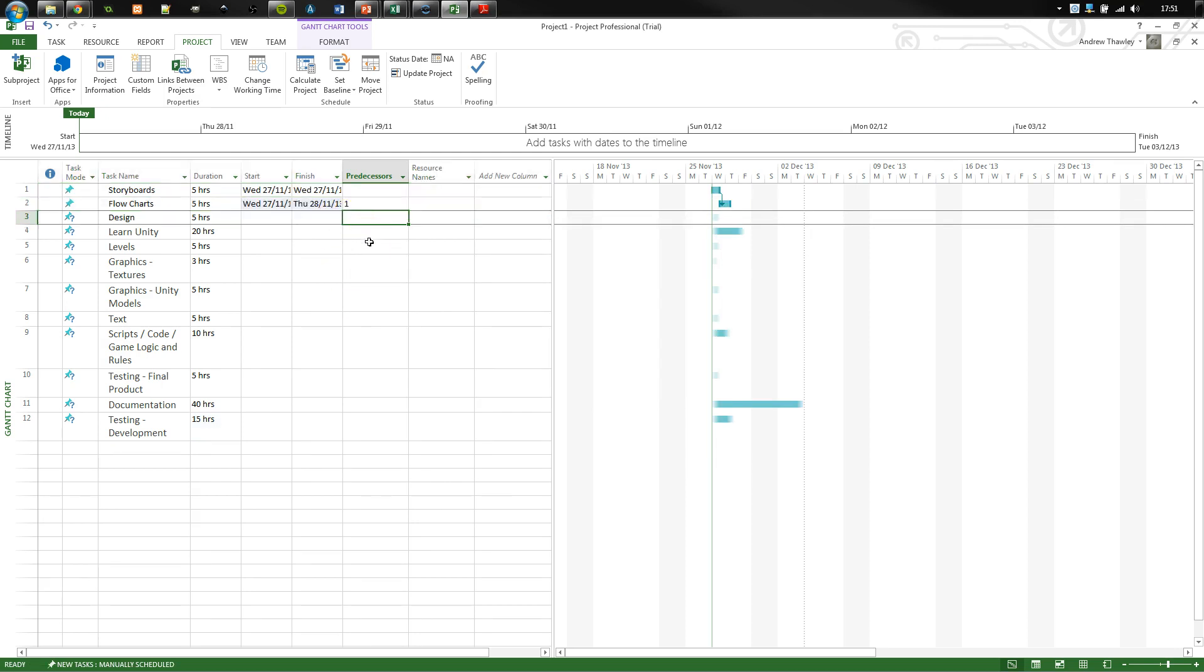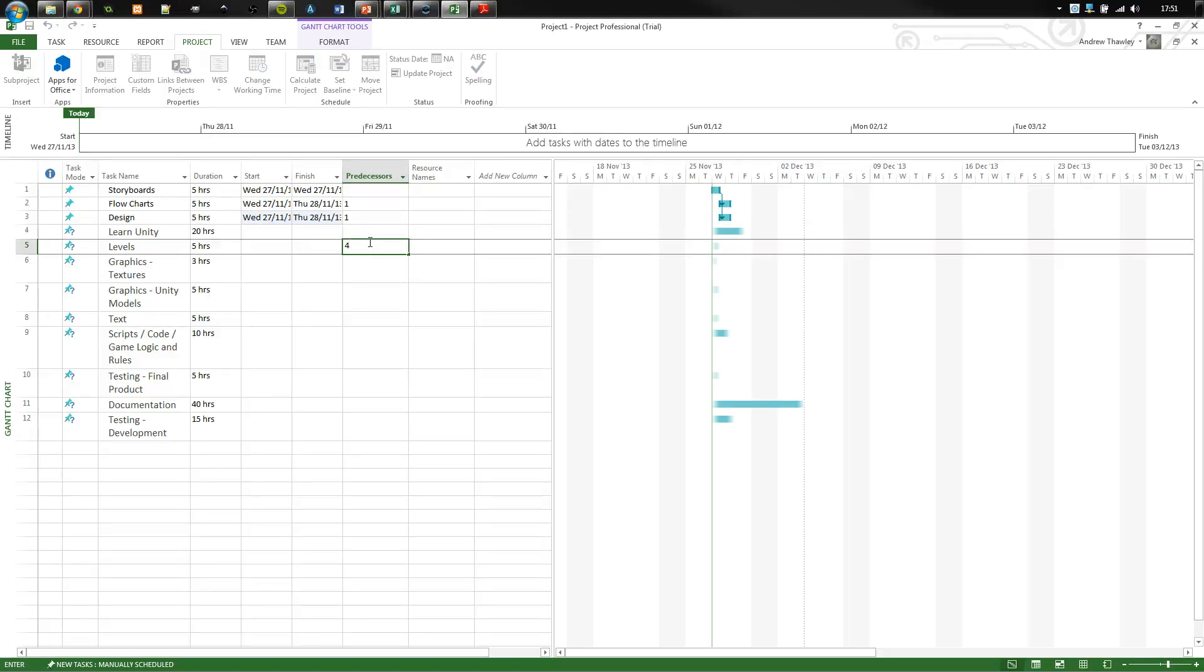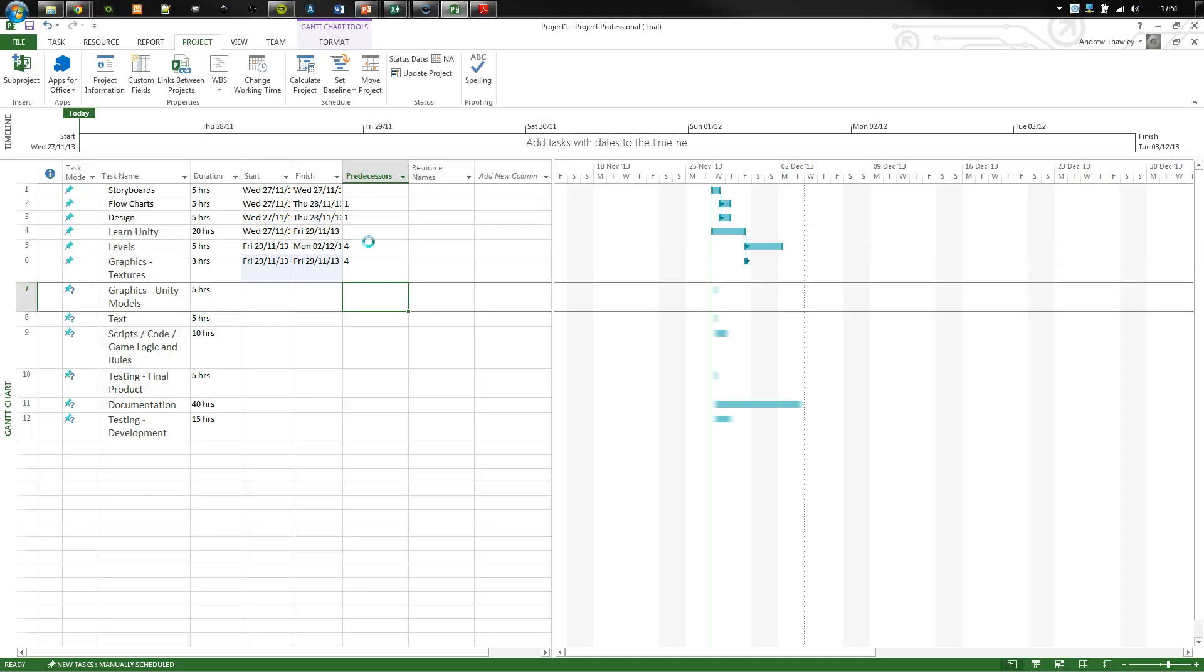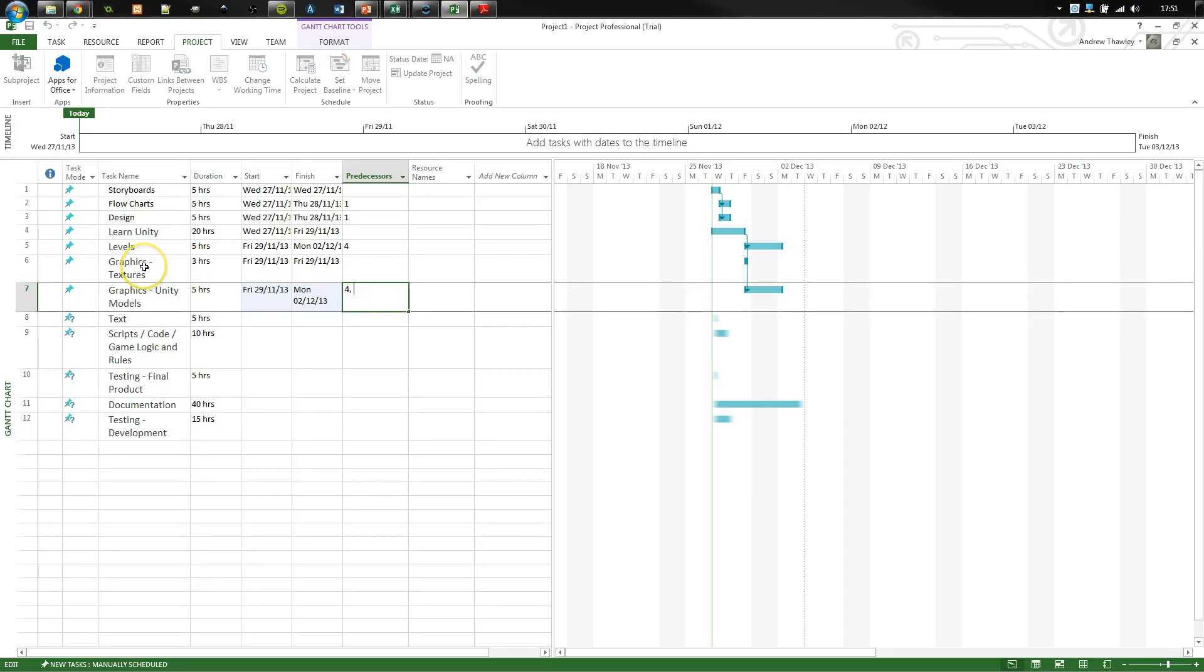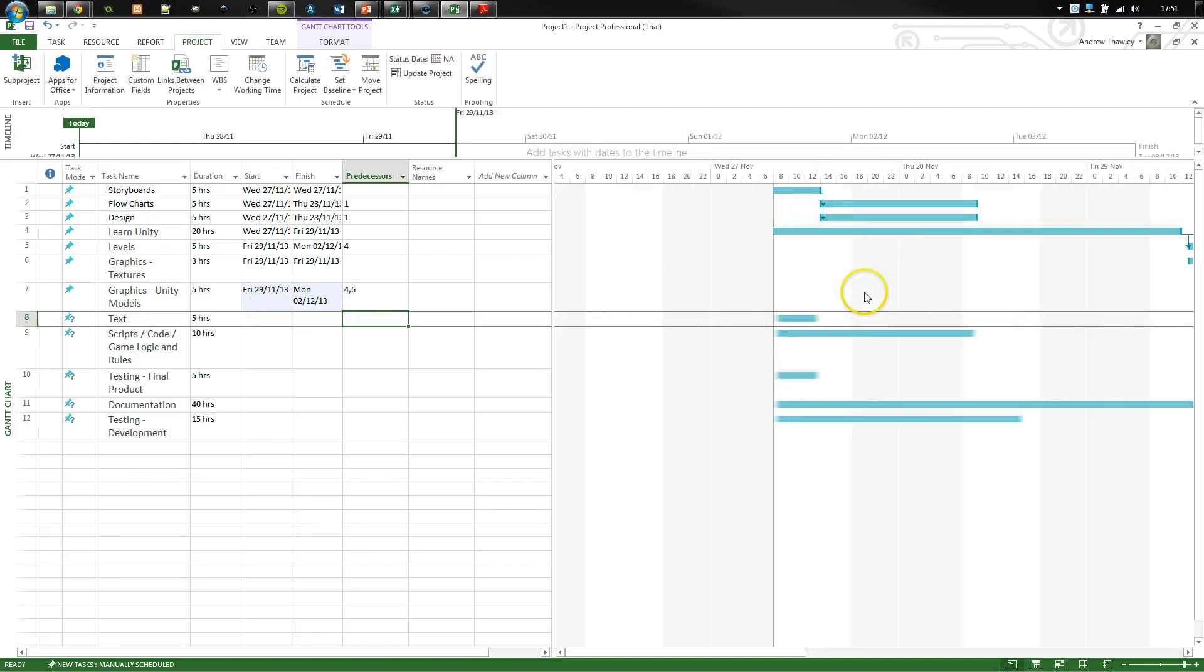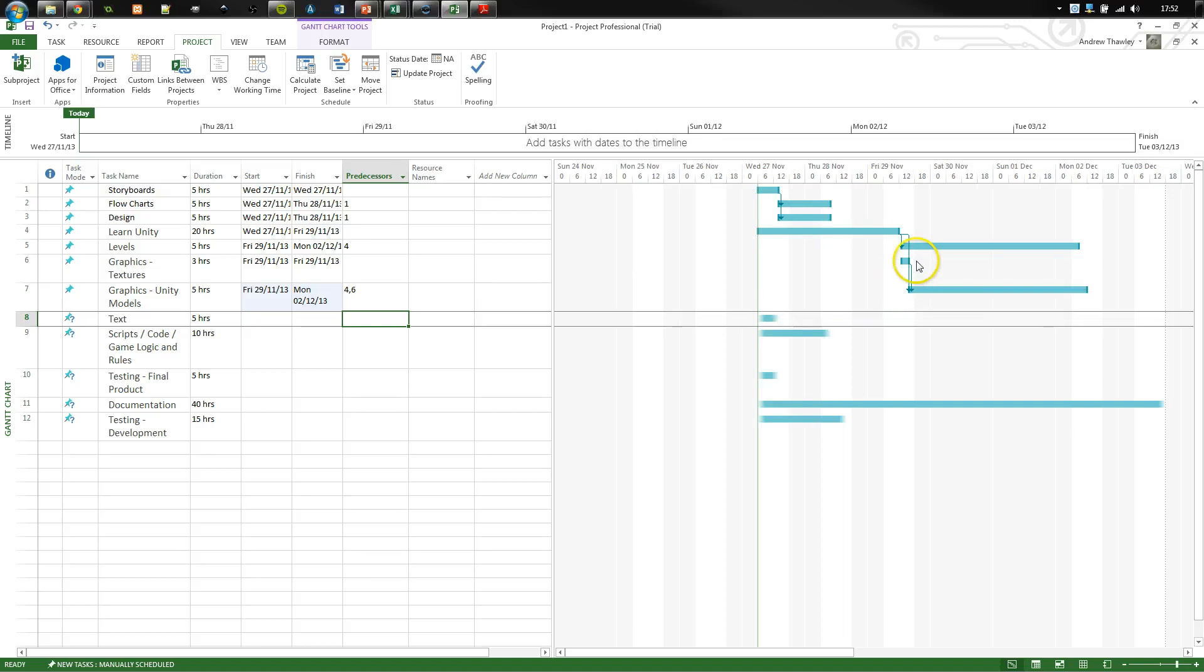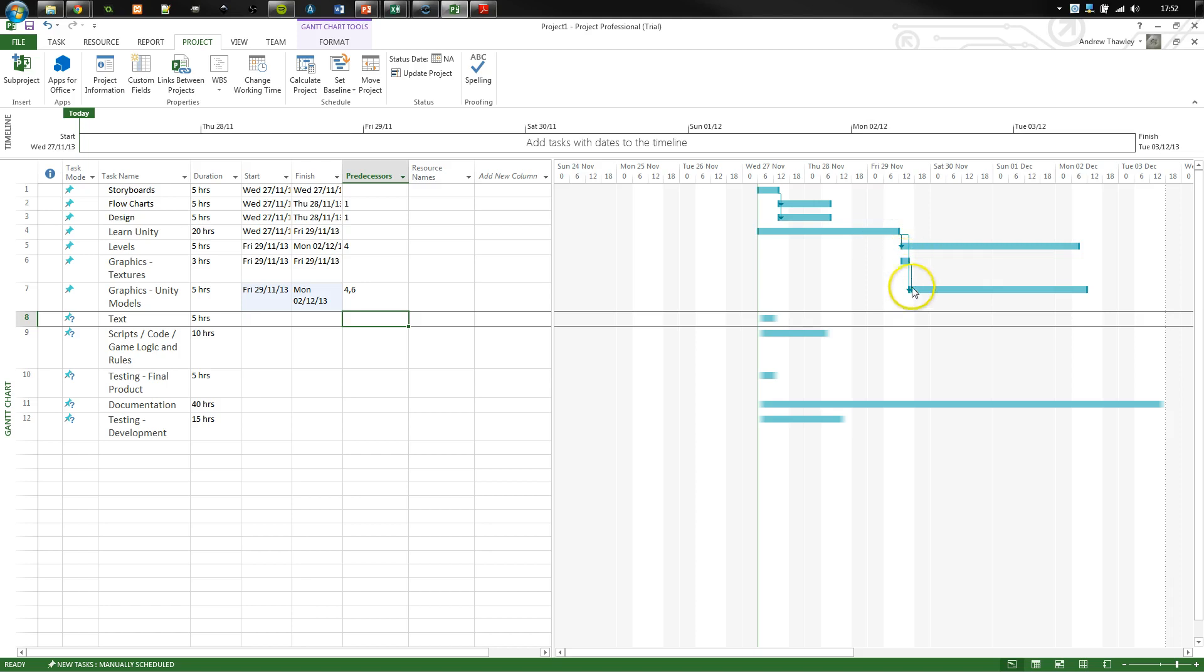What I can also do is just type it in. So, learn Unity, that doesn't have anything. But in order to make the levels, I need to be able to have learnt how to do Unity first. Now, the graphics and Unity models, I need to have learnt both Unity as well as the graphics textures. So I can set both of them. And what you'll notice on the side here is that it's now got two little arrows. So it's saying these two tasks, this task and this task need to be completed before I can start this next one.